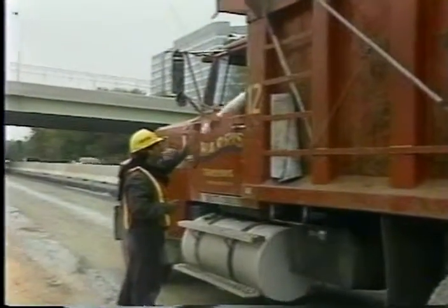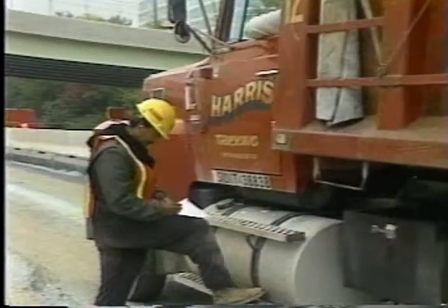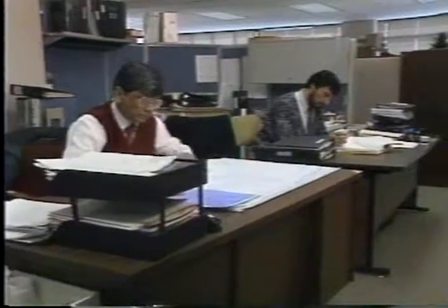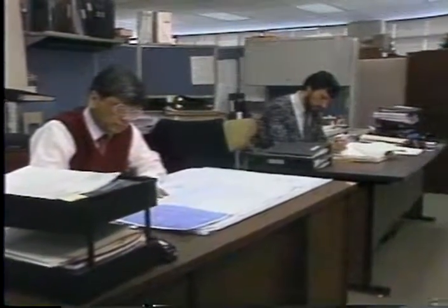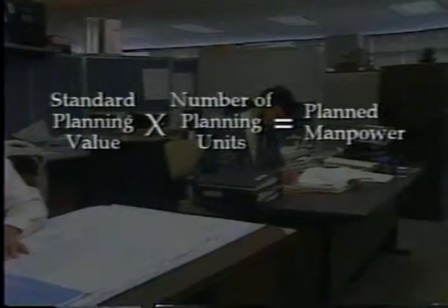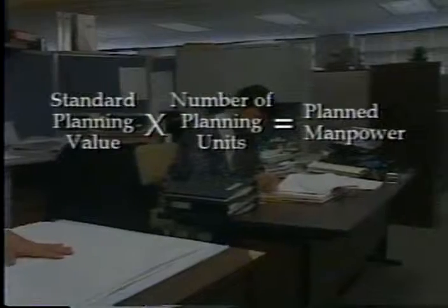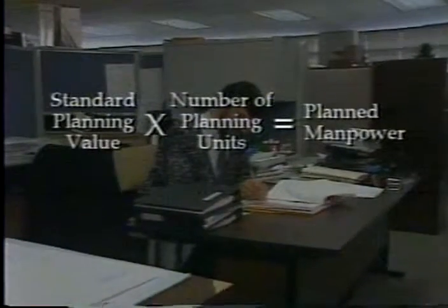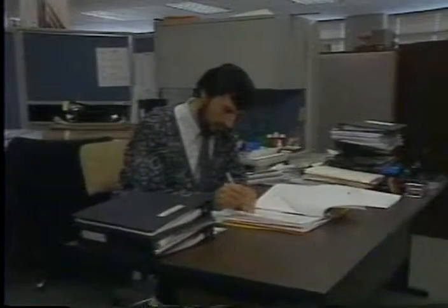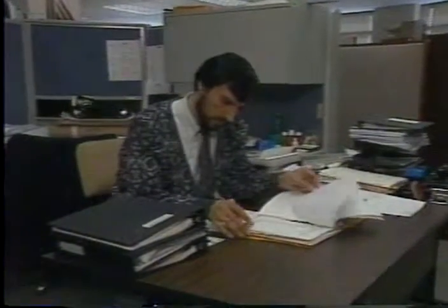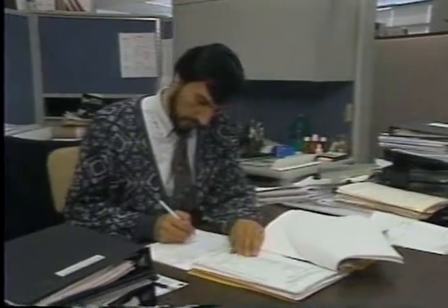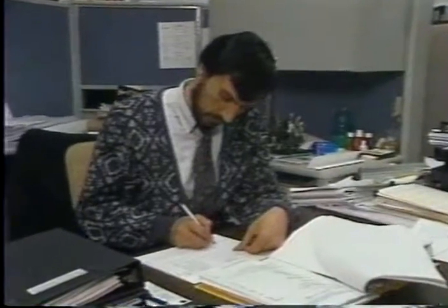Planned manpower may be computed in terms of man-hours or man-months, regardless of planning method. The basic computation is standard planning value times number of planning units equals planned manpower. Computations should be made for each applicable activity and totaled to determine the total needs for a contract.